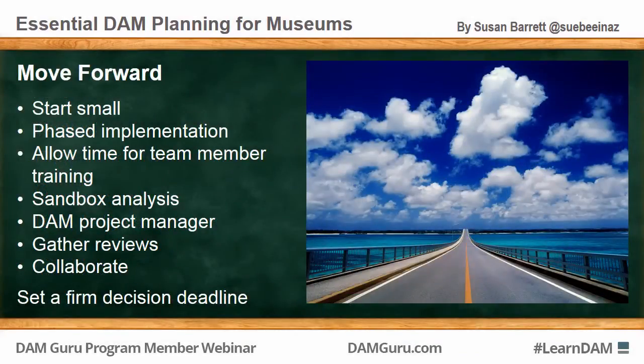So my recommendations are: start small. Images of museum artifacts, for example. Manageable, discrete tasks allow you to work at your own pace. And employ a phased implementation with time for analysis and refinement of process and workflow. Allow time for team member training, and perform sandbox analysis.